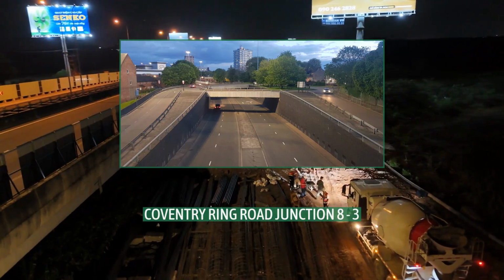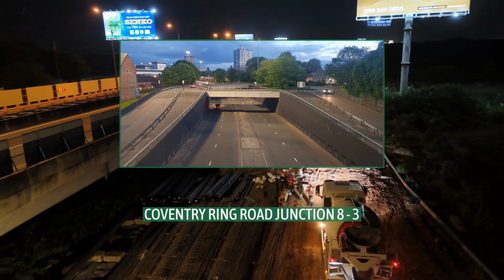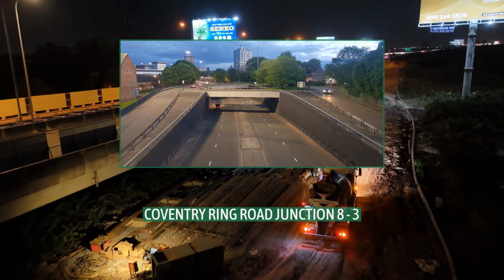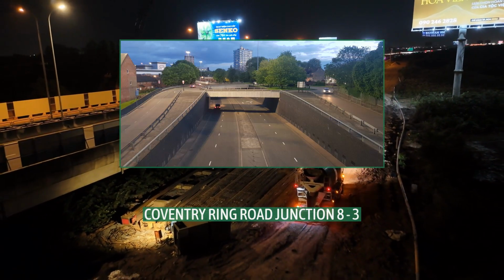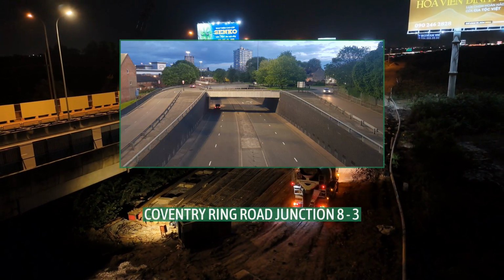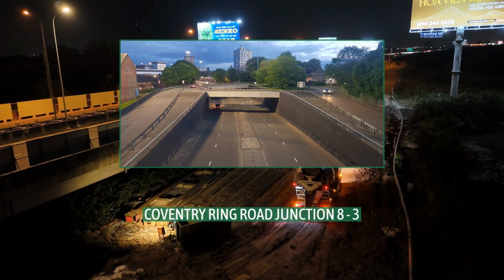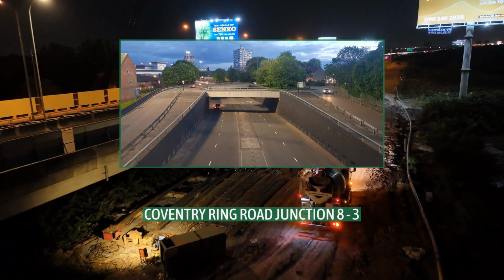Galliford used a pair of 50 LT cranes to lift the beams into place. Beam laying was finished in mid-1969 and was followed by approximately 10 months of road surfacing and finishing, including decorative slabs made with white spar from the Isle of Skye, which the designers hoped would soften the starkness of the concrete.